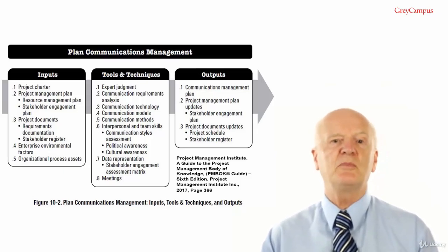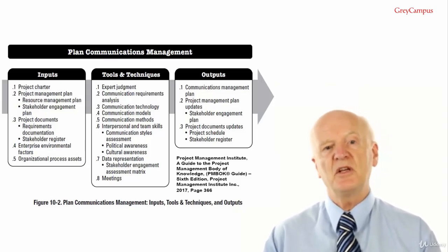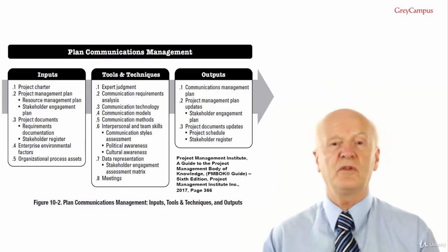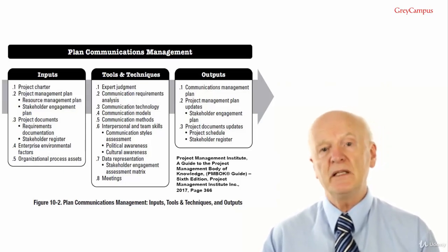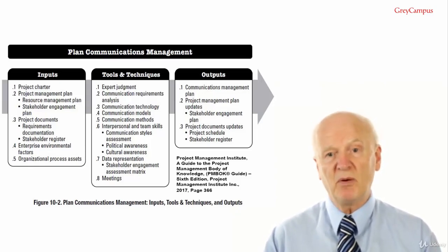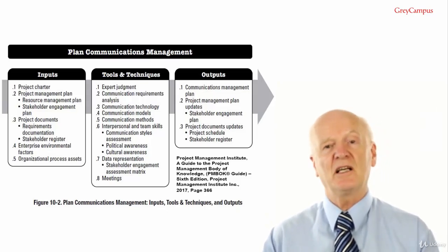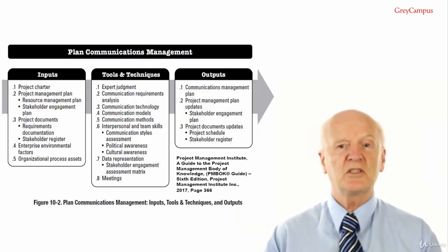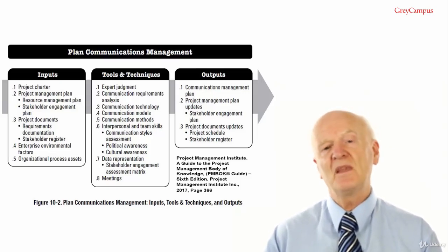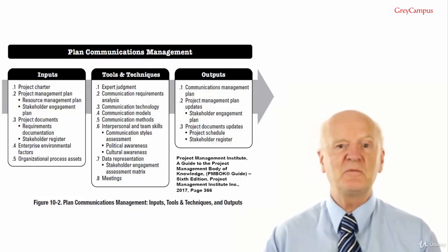The following steps should be used for planning meetings. Prepare and distribute the agenda, stating the objectives of the meeting. Ensure that the meetings start and finish at the published time. It's been my experience, most meetings start at the scheduled time but usually run well beyond it, so you need to keep a tight rein on them. Ensure the appropriate participants are invited and attend.